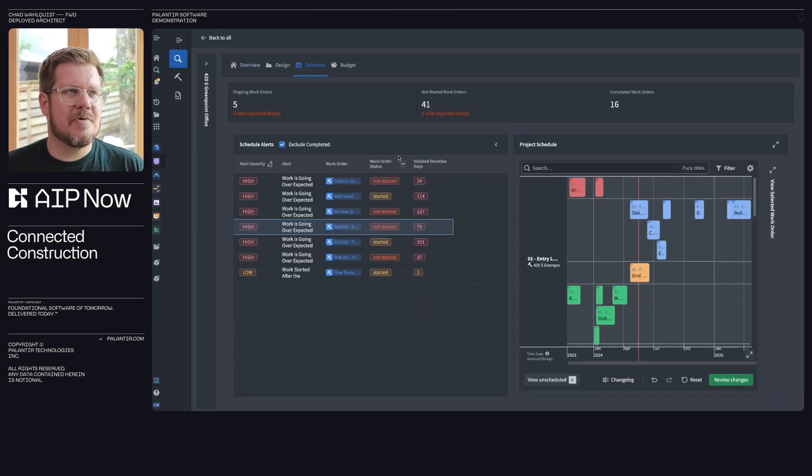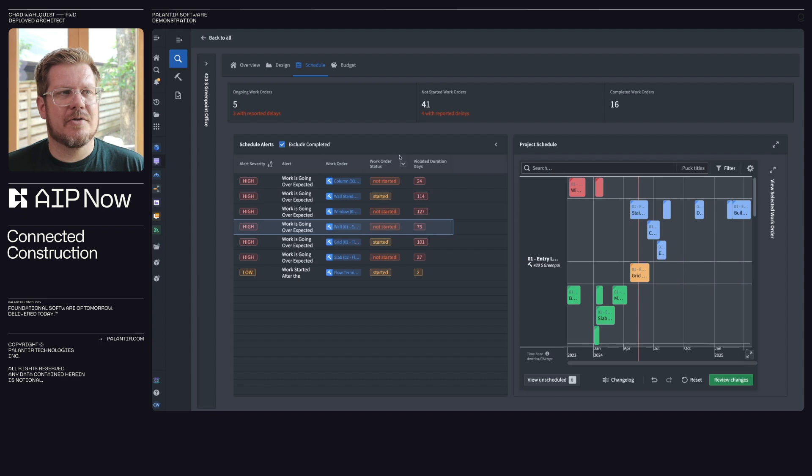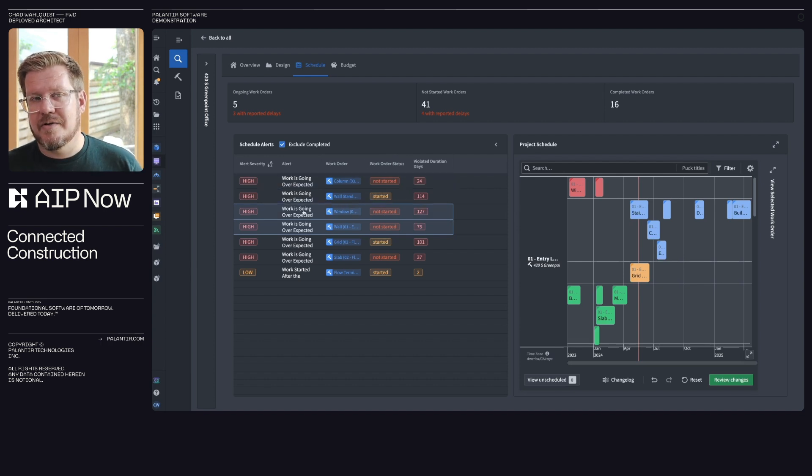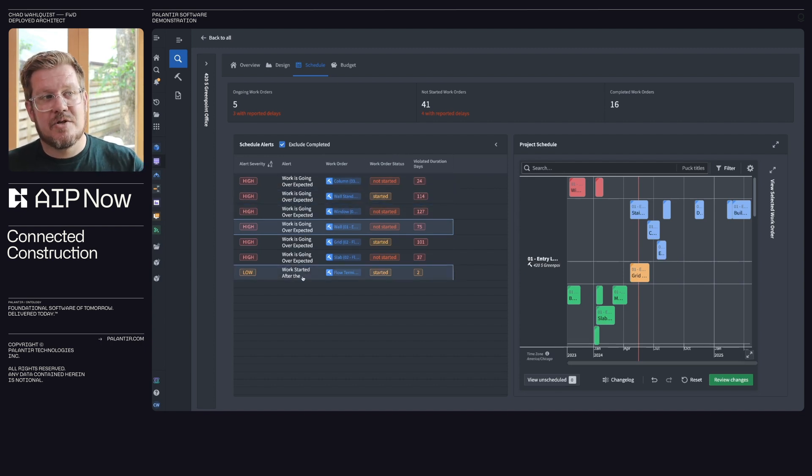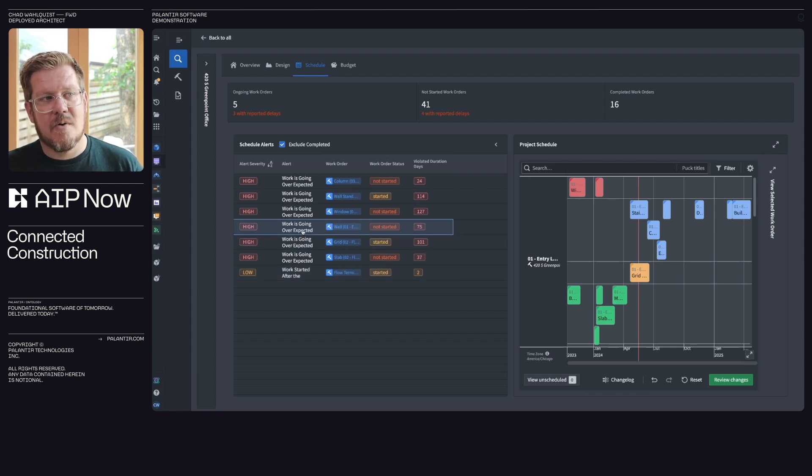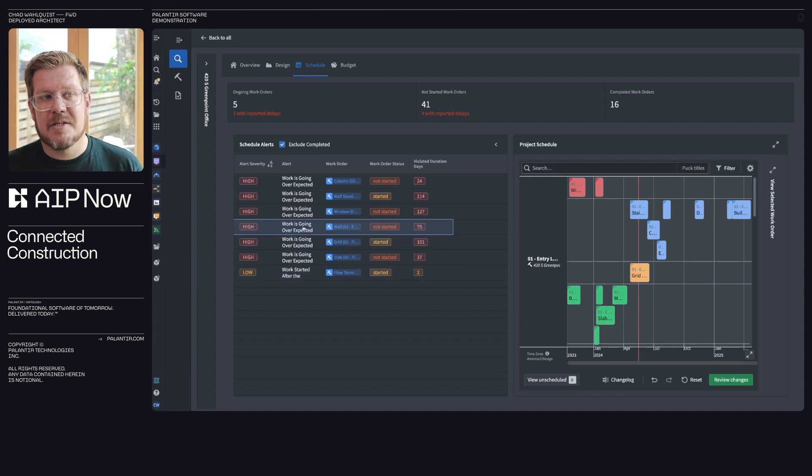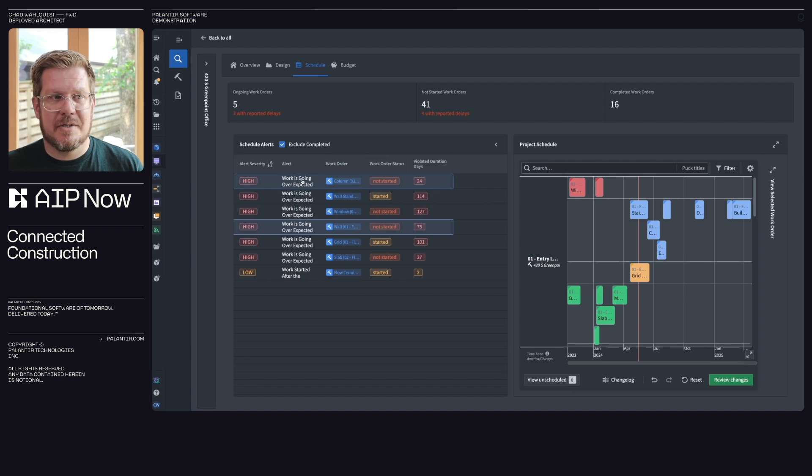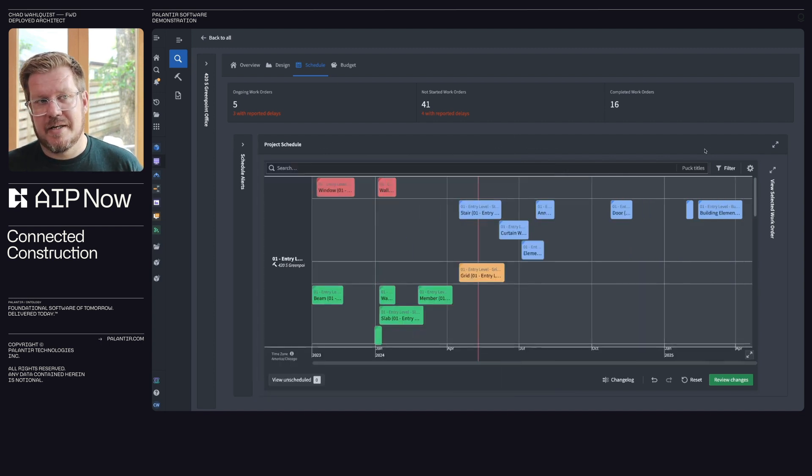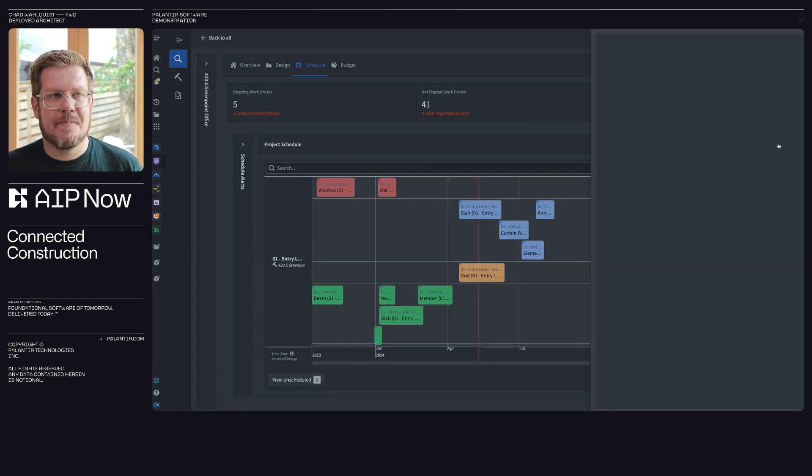So if we click on schedule, then we can also see things that are alerted. So I can go in and generate alerts. Hey, I want to know when something started later than it should have, like this one, or the work's taking longer than expected. What do I need to do? Are we blocked on material? So this gives me the key indicators of what I want to dig into and look at.